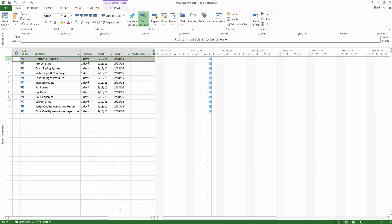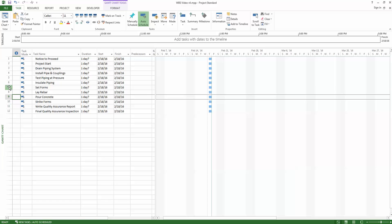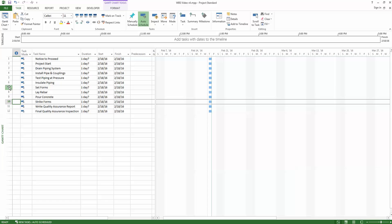Let's first show what we mean by a bottom-up approach. On the screen we have a sample Microsoft Project schedule. Here our first schedule creation effort was to list out all the required tasks. Afterwards, we note that Set Forms, Lay Rebar, Pour Concrete, and Strike Forms are all similar tasks — they are all required for producing the Thrust Block deliverable.